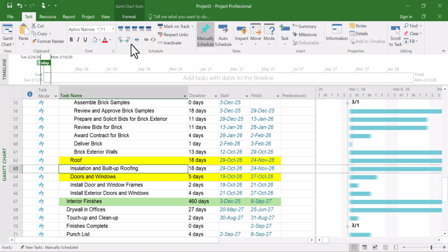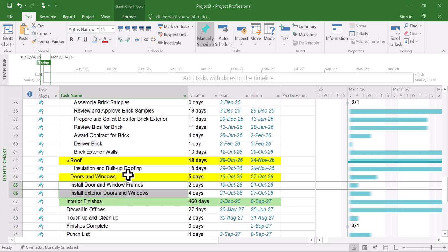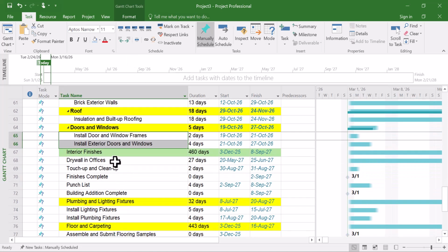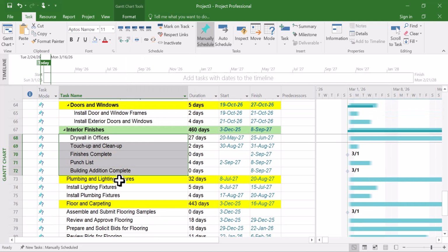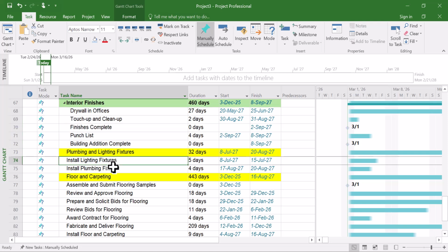So the way you manage WBS in P6, you have a separate window to manage WBS, separate window to manage projects. But in MSP, you don't have that. You manage everything on the same interface, both the project, the activities, and the WBS is on the same window. So that's what you need to take note of.